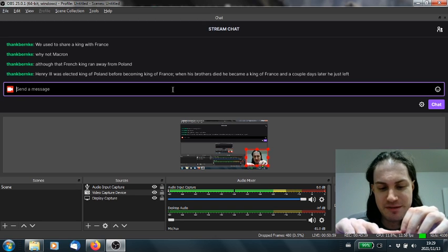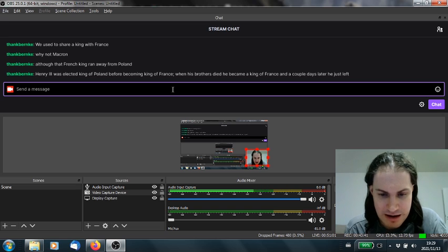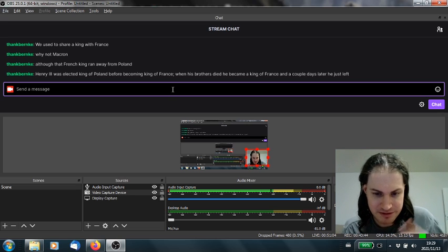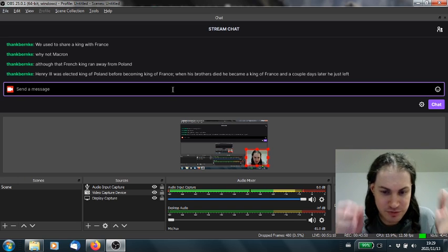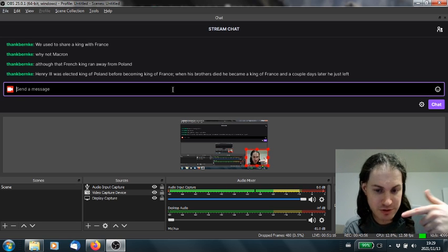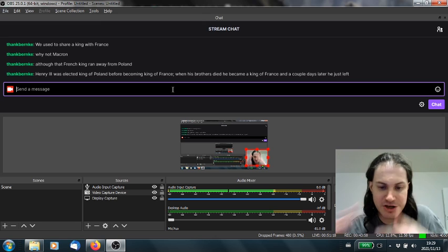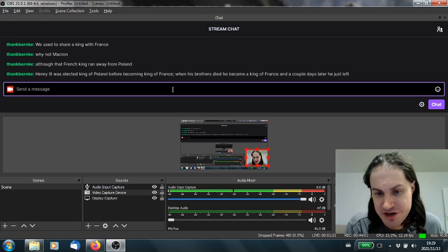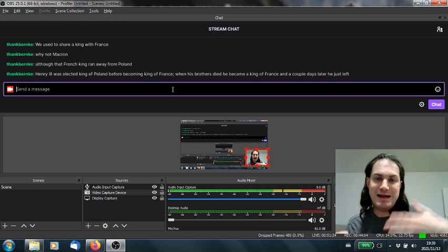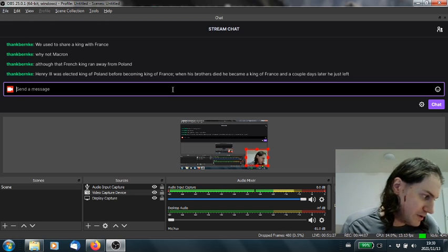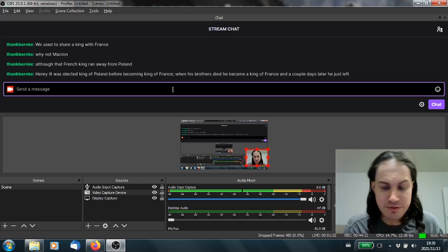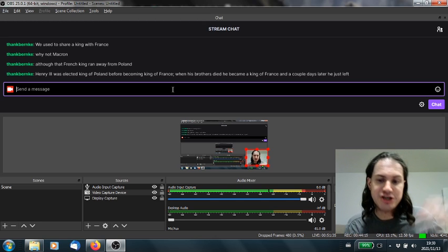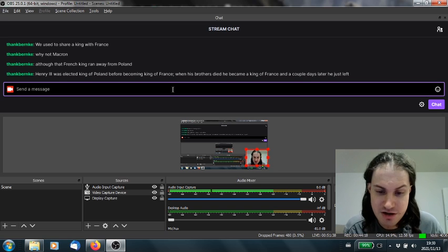And then construction is something completely different. If I'm a building contractor, I'm responsible for digging the tunnel, right? Someone gave me the design. I need to build to that design. So I need to dig the tunnels. I need to get the tunnel boring machine to bore the tunnel. I need to do the stations, which are generally going to be cut and cover. I need to do the finishes. Again, maybe I'm the person who does all of these, but these are usually broken up between different companies, between different contracts. So maybe I only have a piece of this. Maybe I just do the tunneling, or maybe I just do the finishes.